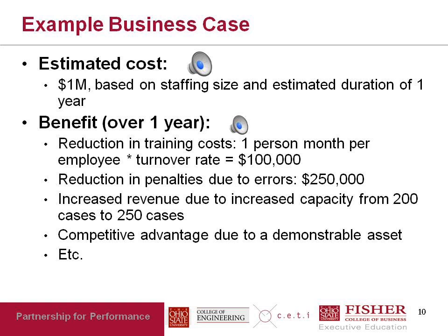So adding all that up meant that we could see a dollar return of about $700,000 in the first year of operation itself. So the thinking was, hey, if we build this system and spend $1 million, then within a year we'll have made back most of the money, and in 2 years we would have certainly made back all of the money. But there was also a soft advantage, a non-quantifiable advantage.